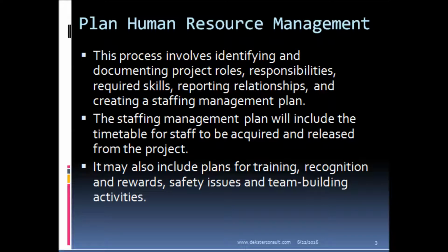The first process, plan human resource management, is a process that involves identifying and documenting the project roles, responsibilities, the required skills, the reporting relationships, and finally creating a staffing management plan. What is a staffing management plan? It is a plan that gives us a timetable for staff to be acquired and released from the project.